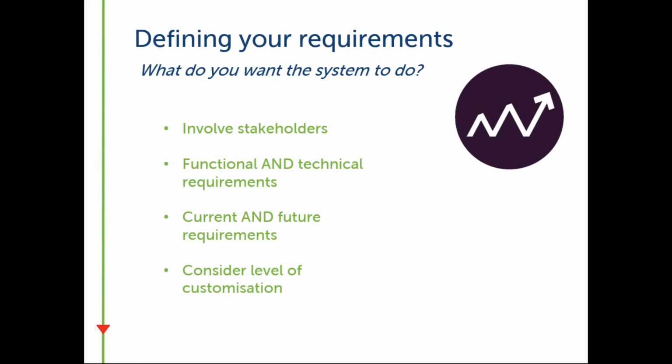And also here, it's good practice to make sure that you understand the level of customization or configuration needed to realize these requirements, and maybe scale back in some areas if you need to, because customization is really tempting, but will definitely add considerable costs to the build of your system. So as I've already said, it's often a good idea to start with something fairly out of the box, and then you can customize and develop your relationship with the vendor as you go.